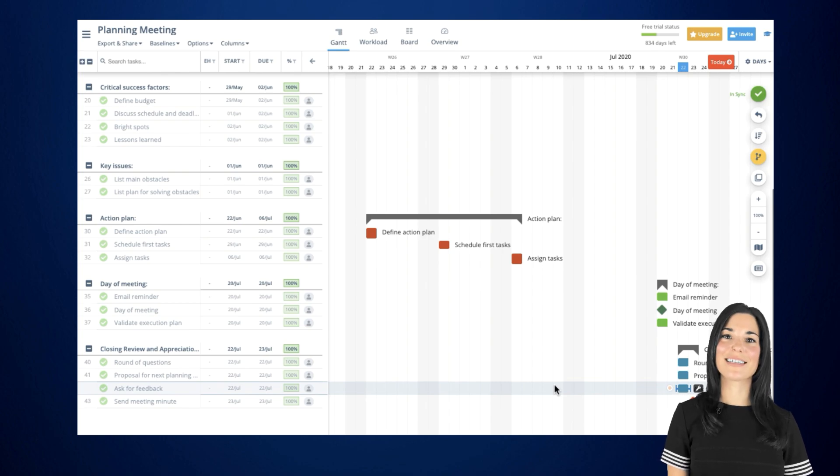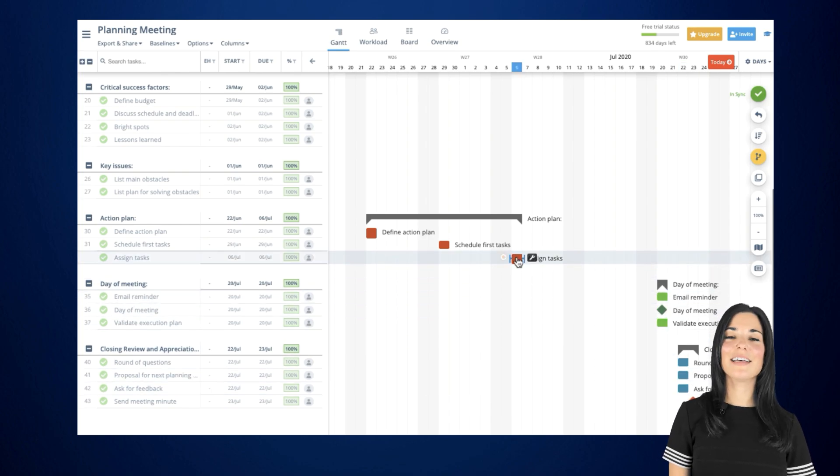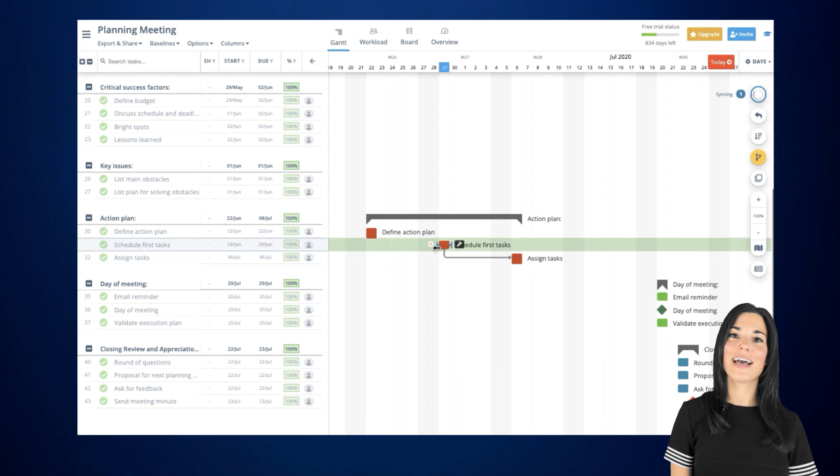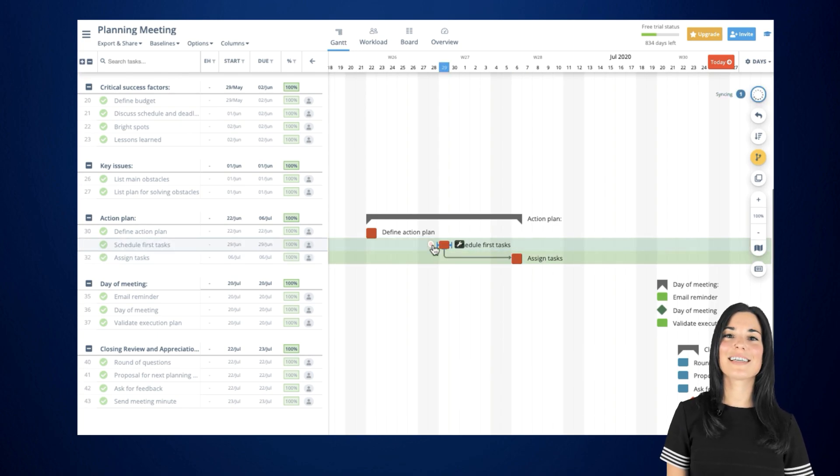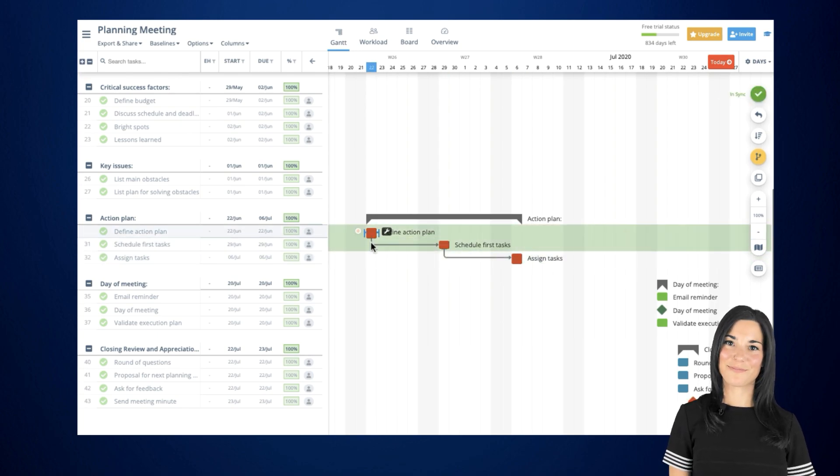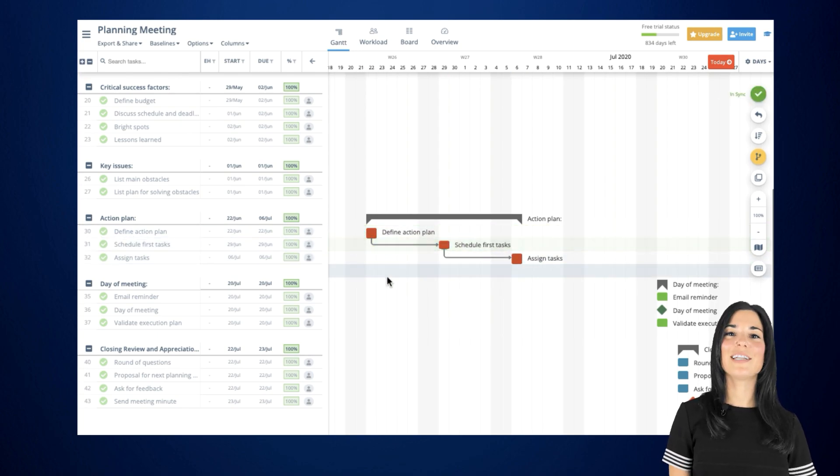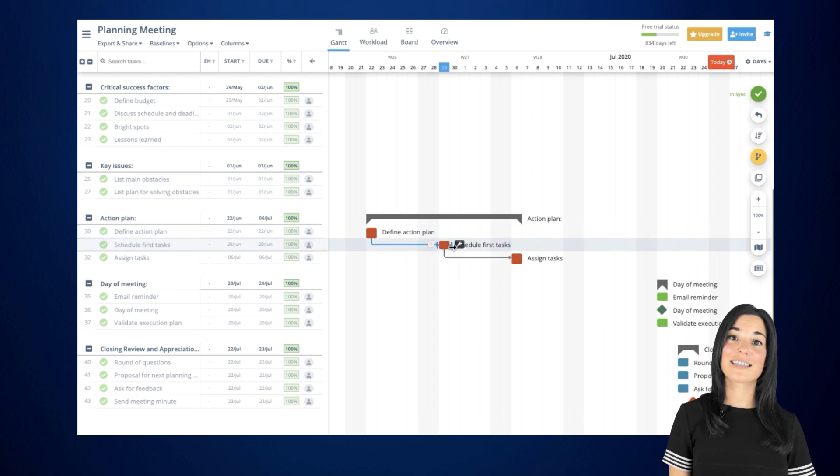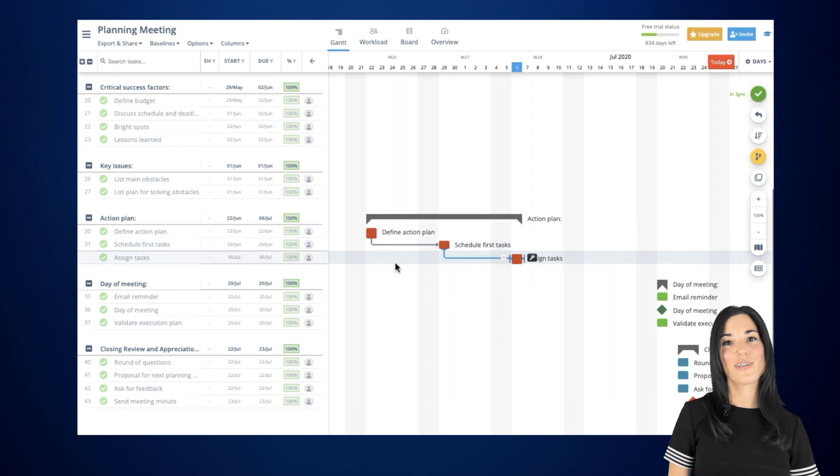To create a dependency, simply hover over a task, click on the small dot on the left side next to the taskbar, and drag the dependency line to the task you wish to link it to. You'll quickly notice a gray line that indicates the tasks are now connected to each other.